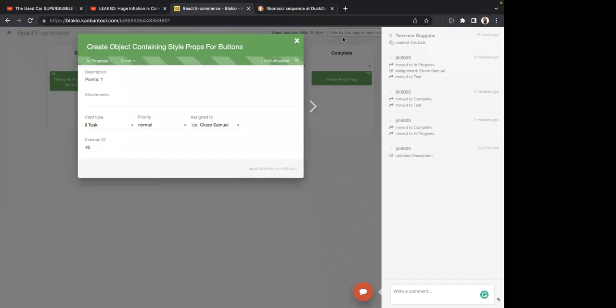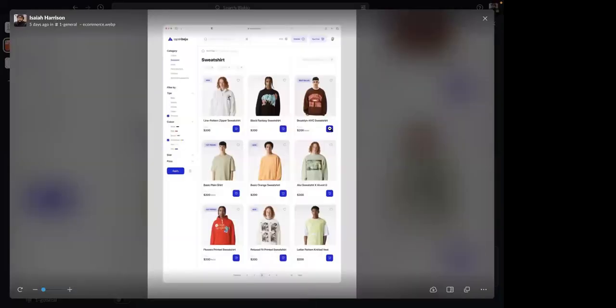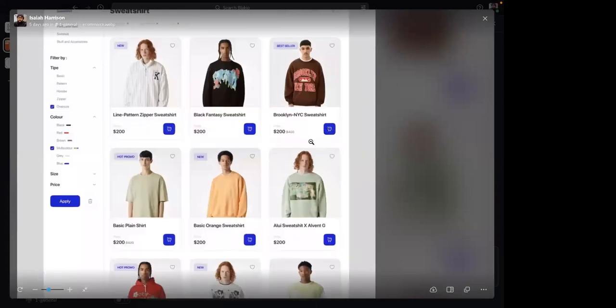That explains it. Probably part of the reason why you didn't see more tasks on there is because we have giant tasks, but really 1 task is probably 5. You know what I mean? Like creating that object for the styles, for the buttons, we're creating a generic button component that's reusable with different styling. Really, 1 person should create the styling for the favorites button, and then 1 for the apply button. Even though they're being used in the same component, the styling should be separate tasks. So I understand that now. Right.